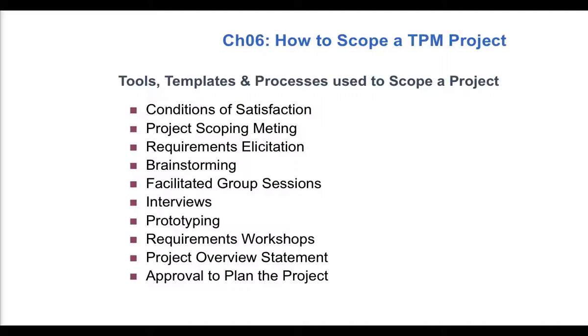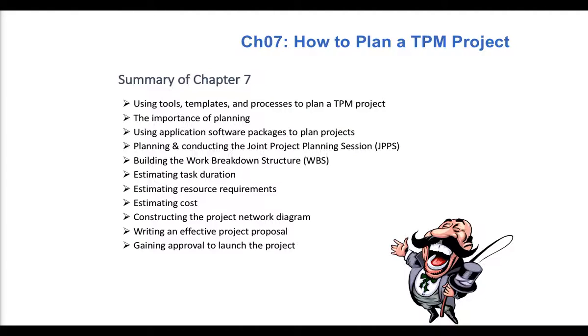And that's project overview statement. It's a high level, hopefully one-page statement of what the project is, what its business value is, and maybe what risks, what other things, but it's a one-pager. That project overview statement is approved so that you can move to planning the project.